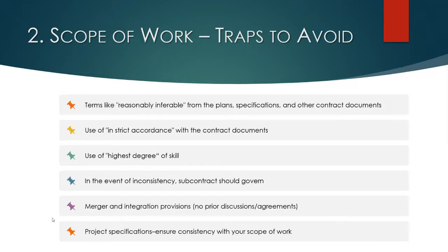Going back to the point that I made on your proposal, we'll see merger and integration provisions in subcontracts, which is a fancy term of art that basically says that any other agreements that you had before this subcontract are no longer of any consequence. So if you want a document that you have executed or agreed to with the general contractor to actually be a subcontract document, make sure that it is part of that subcontract, because if you have the merger and integration provisions, that prior document is not going to have any effect.